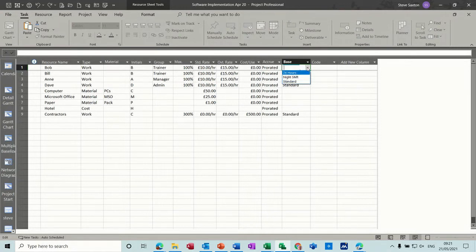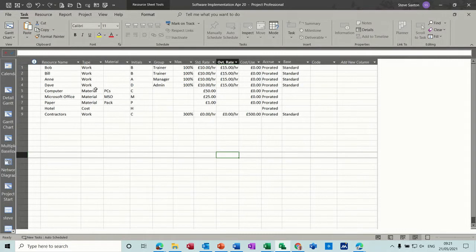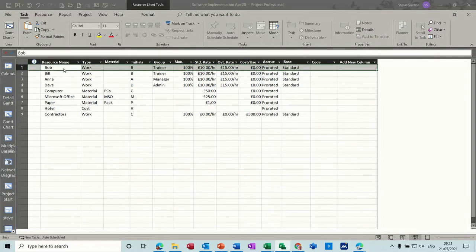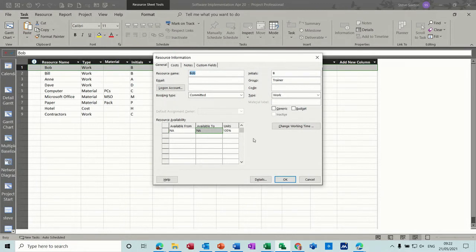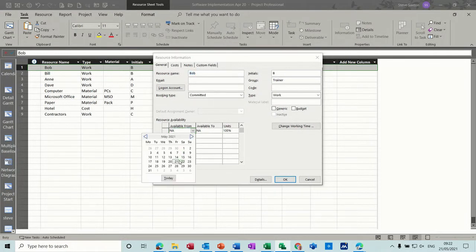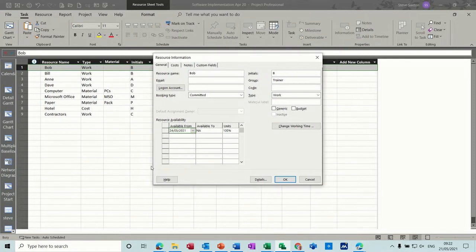Once you've typed your resource list you can double-click into them. I'll double-click into Bob and adjust his availability. At the moment he's available from the start, but if I say he's not available until the 24th that means that's when he can start. This will then have an impact if you allocate Bob to a task.